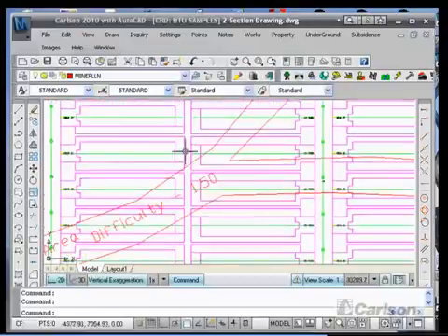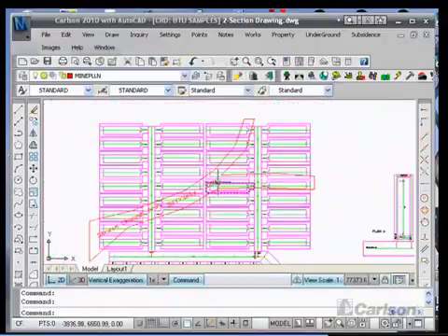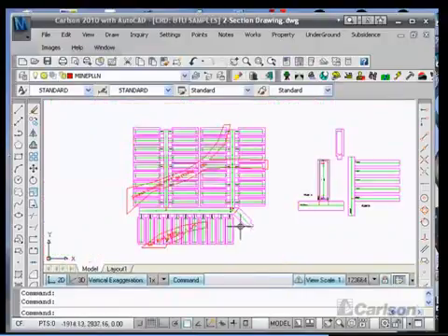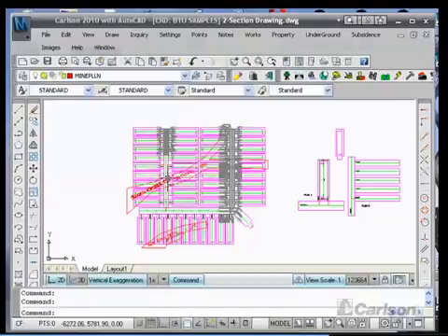And in this case, where a stream channel came together, we set the difficulty up to 1.5. That will slow mining down in these areas based on what they would normally do. They'll be divided by either 1.5 or 1.75 in those cases.